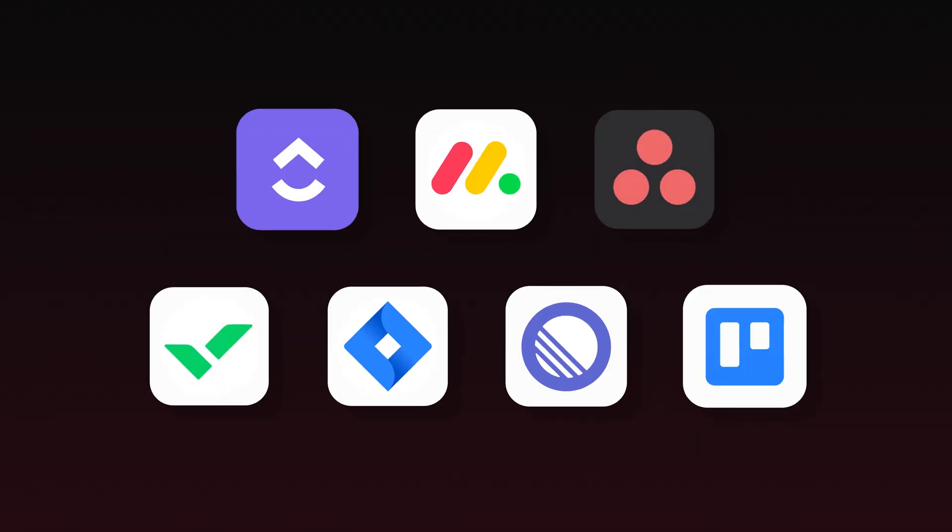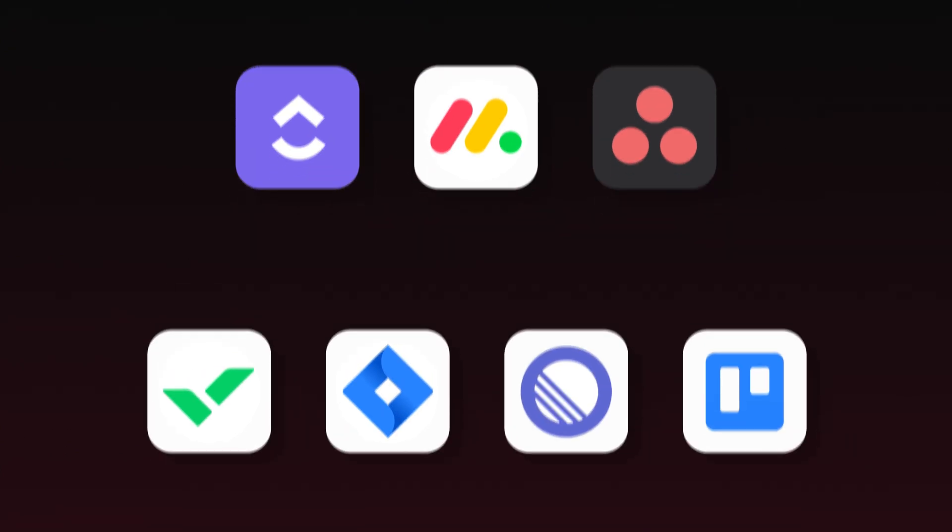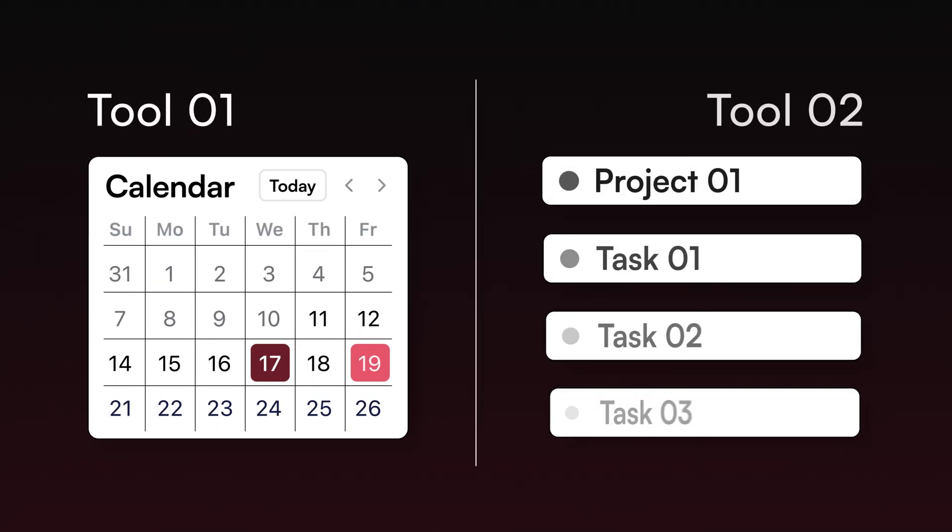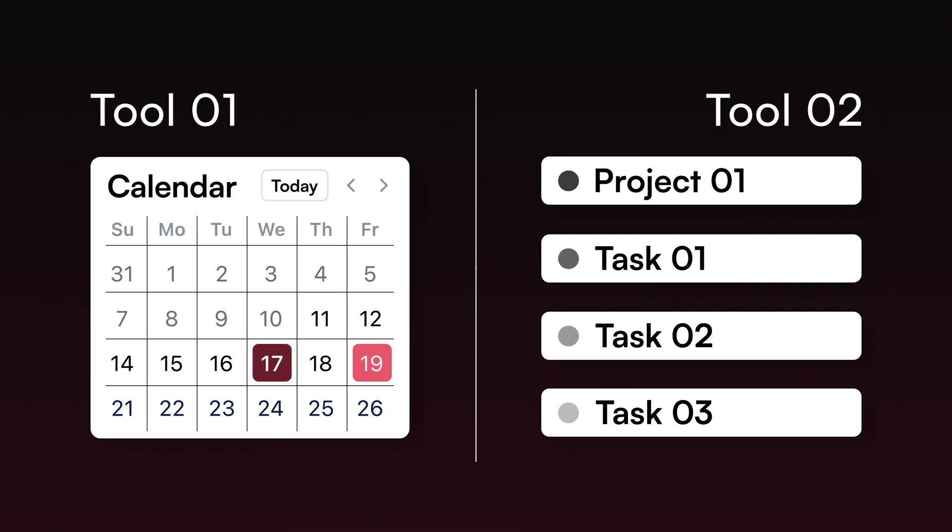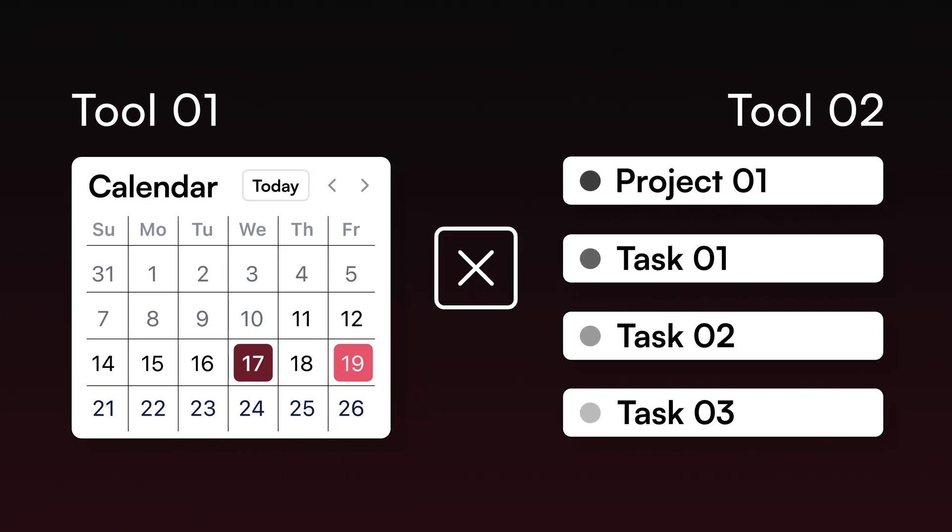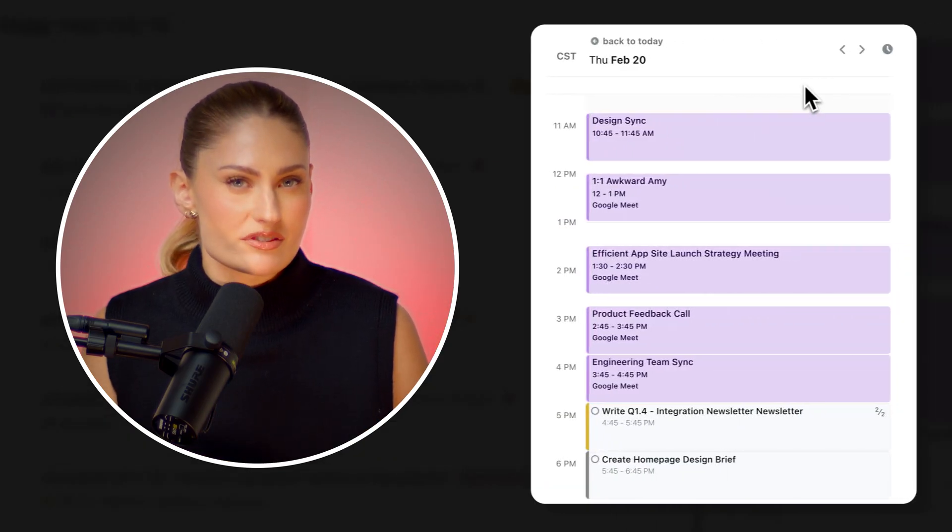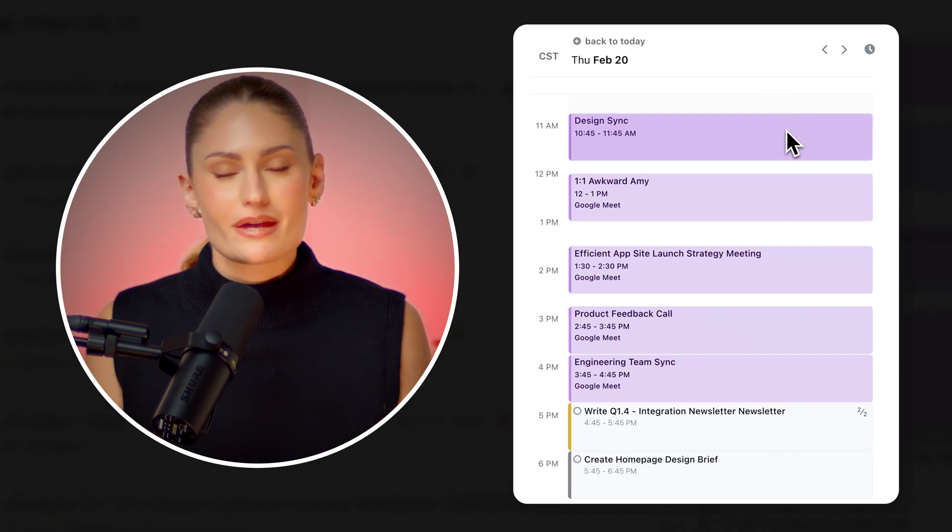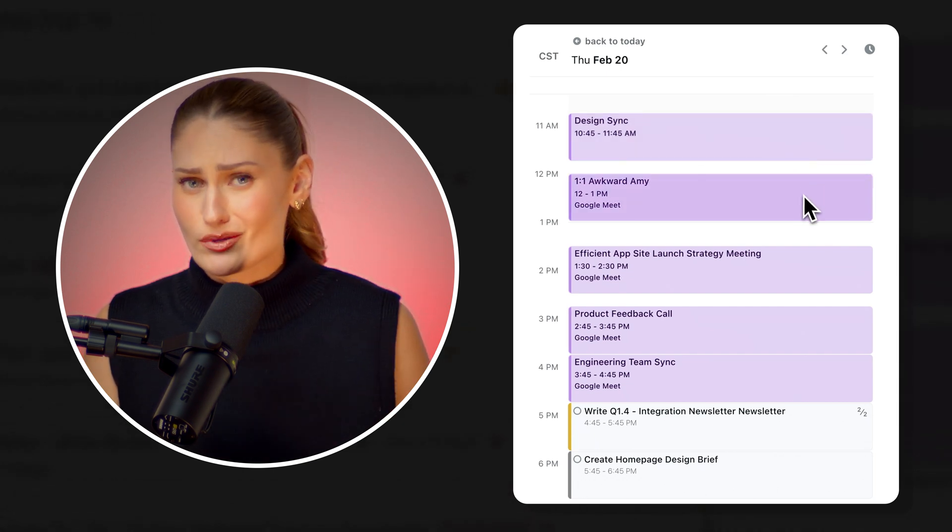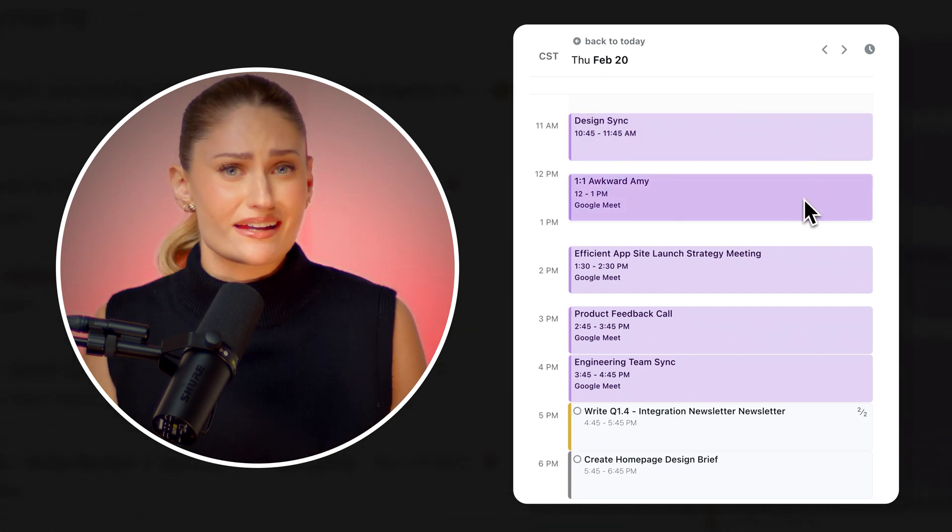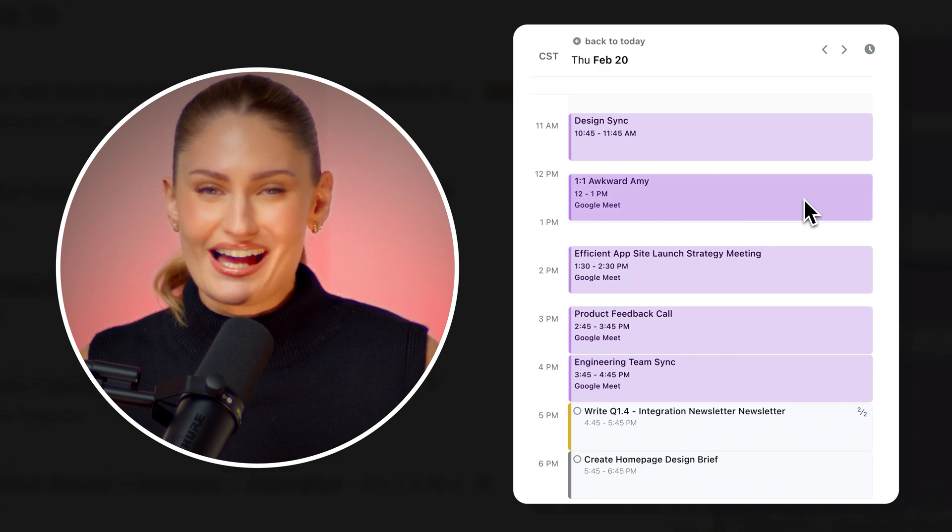Currently, project management tools operate separately from your calendar, so you have your meetings and appointments in your calendar, and then your projects and tasks in a second tool, and they don't talk to each other. So if you have five hours of meetings in your day, but your project management tool says you have seven hours of tasks to hit your deadline, how are you supposed to get all of that done? You can't. So you fall behind.